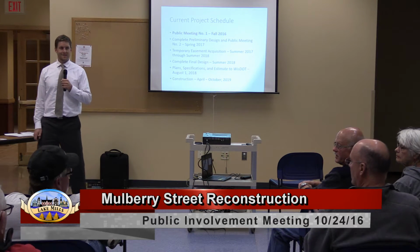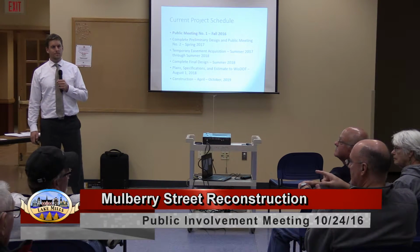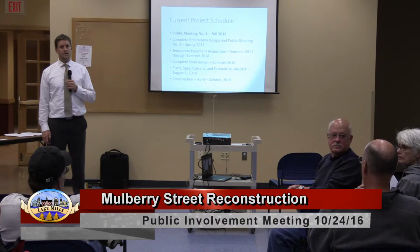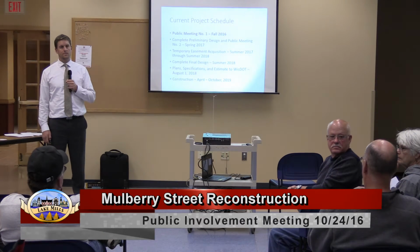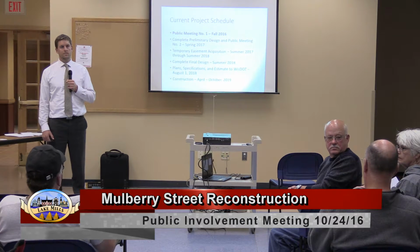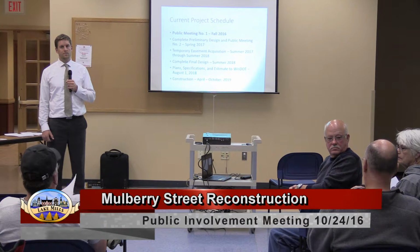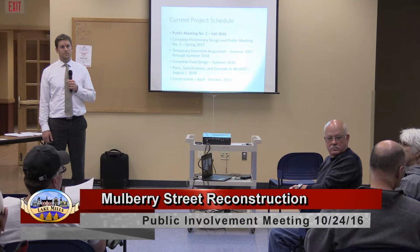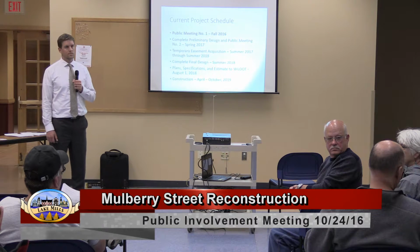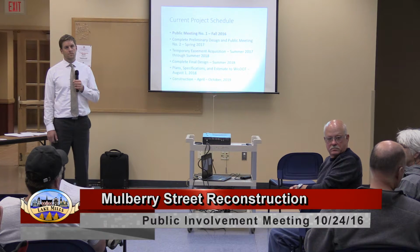All right. We'll get a letter in the mail, you think, when the time comes for that? There are going to be a group of letters. 45 days before we think we're going to start construction, you get a letter that says you might want to start considering replacing your portion of the lead lateral. We probably can have someone in the next 12 to 18 months come through and do an inspection, see if it's lead or not. And then we'll probably again encourage you to do it. And then when we replace it, we'll probably come up and say, if you're not replacing yours,